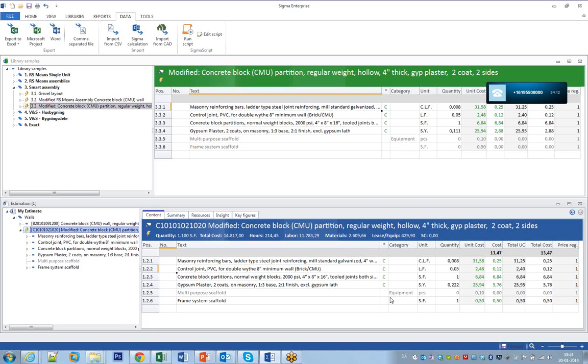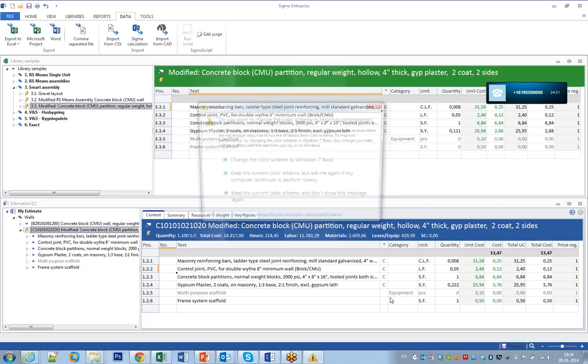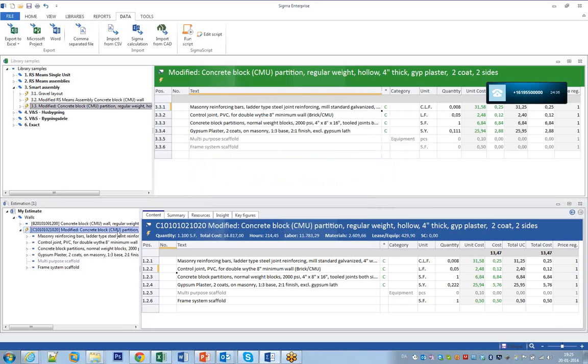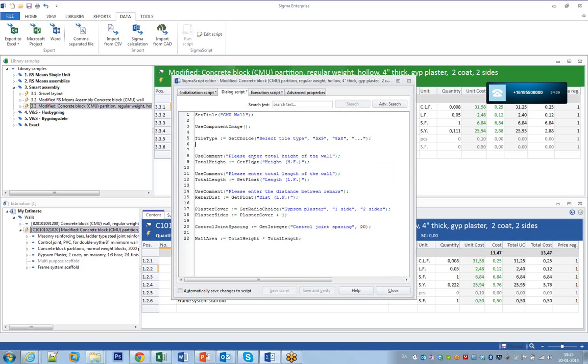Things like concrete. In our basic estimating, which is our very simple one, we'd have to have an assembly for 6-inch, an assembly for 8-inch thick concrete, an assembly for 10-inch, and an assembly for 4-inch, right? Well, in your case, they're going to come up and say it's 4-inch. But then the next choice in my assembly is, okay, what kind of base material? Are we using native materials? Are we using crushed rock? Are we using whatever? And based on whatever is selected, that determines the cost for the base material. So yes, we can give you an example of exactly how that would work.